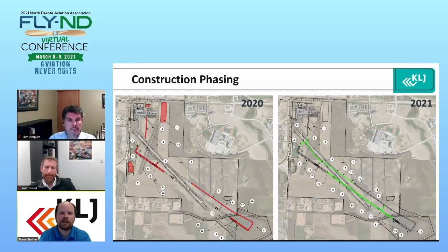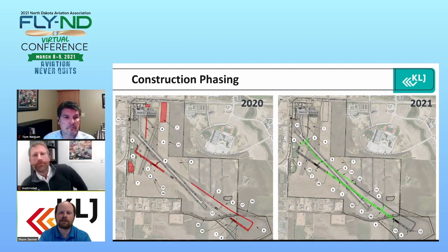So lo and behold, in 2020, kind of our worst fear came to fruition, where there was a cultural find in one of the cut areas. And looking back, it's a saving grace that we did do the 2 years, because with the delay in that, and kudos to the FAA and Sherry Lars for coordinating that effort. It was a big undertaking.